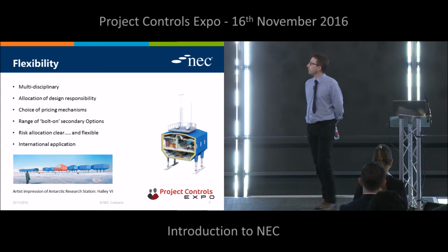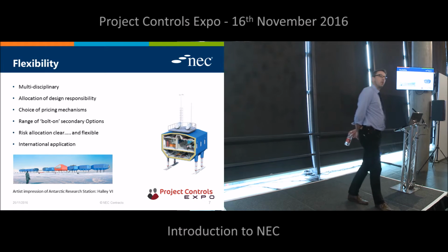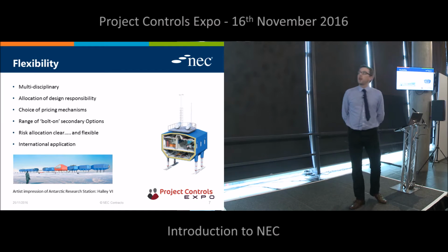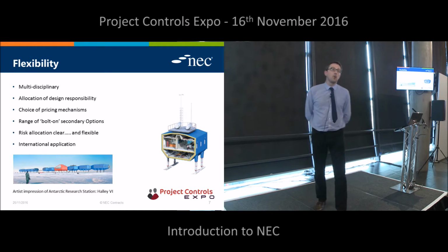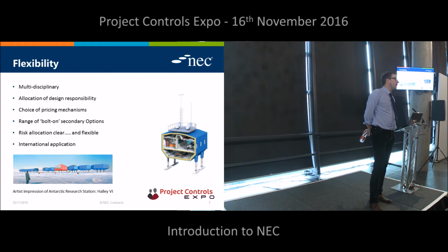Okay. There's flexibility in the pricing mechanisms. So this is one of the key aspects of the contract in terms of the last but one bullet in terms of risk allocation. So depending upon which pricing mechanism you adopt, that influences how the financial risks are apportioned between the parties. Okay.